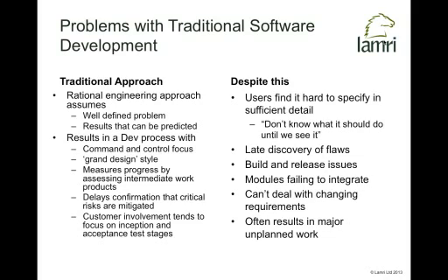The result of that kind of thinking often is a development process that has a big command and control focus to it. It has a lot of the idea of grand design: we'll specify it all up front, we'll design it all up front, and put an awful lot of time and energy into getting the specifications, the design and the architecture right, such that when we code it and test it, it will just work, won't it? We measure progress by assessing intermediate work products, like how far through are we on our design documents and our functional specs. Have I written all my test procedures yet? That sort of idea.